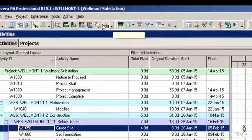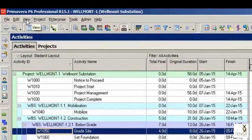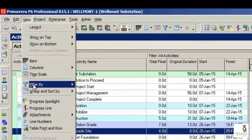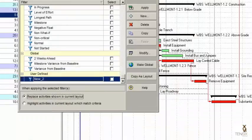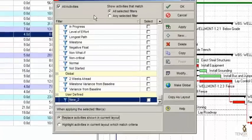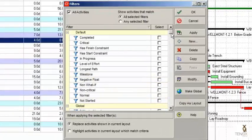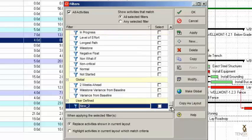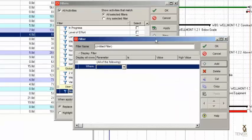Or you can go to the top drop-down menu and select View, and then the filter dialog appears. The first set of filters you see come pre-programmed in P6. The second set of filters are global and they are created by the administrator. Then you have the user-defined filters. We want to create a user-defined filter, so select the new plus button and type in the name.